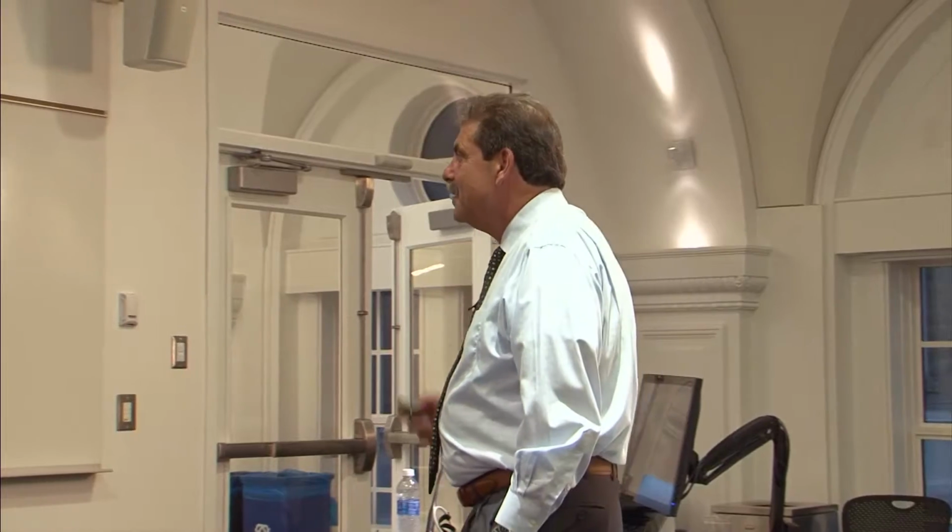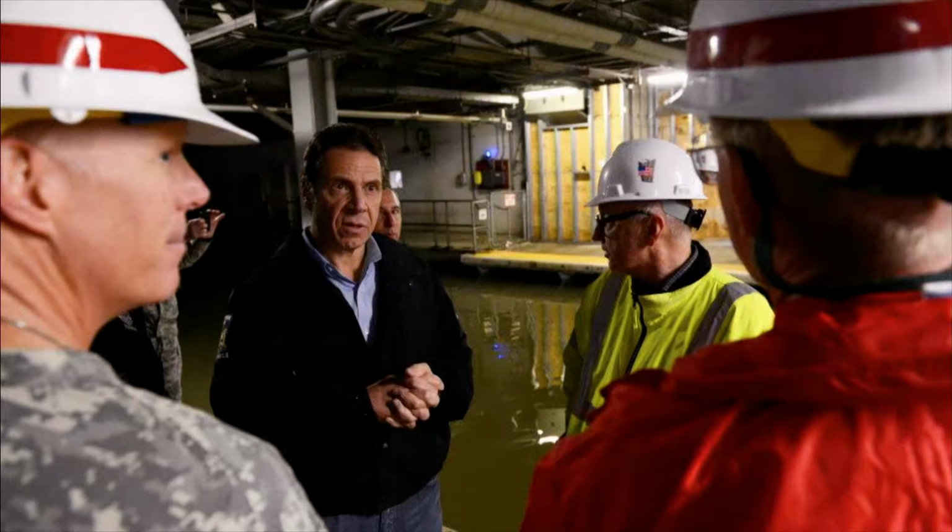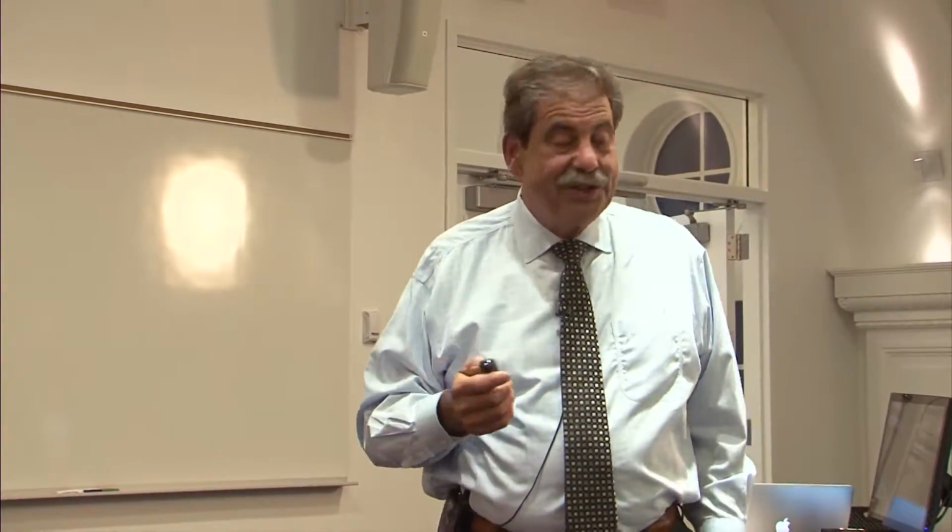Well, Superstorm Sandy hit us. And Superstorm Sandy, this is actually the adjacent site. This is the Vehicle Security Center. There's the governor. This is my active day-to-day client, Steve Plate. That's the railroad station, and that's water basically lapping at the platform edges. Our mechanical room, which is 30 feet tall, was completely flooded. Right after we installed major substations and major mechanical equipment, it was a total loss on the job and had to be redone.